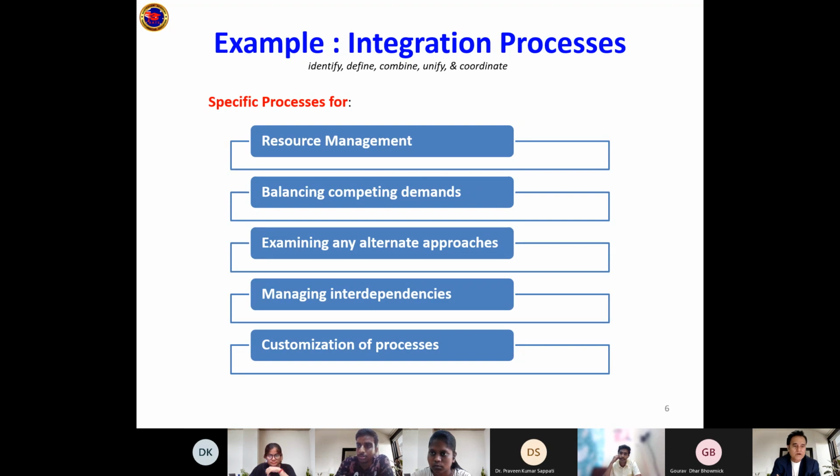In all projects, you will see there are interdependencies. For example, while you're delivering this aquaponic project, multiple teams are working. One team is constructing, another team is laying the plumbing line, the third team is laying the electricity line, but they're working in the same areas. So therefore, there are interdependencies. Similarly, the electrician cannot come unless the walls or the roofs are constructed, or if the aquaponic is going against the wall of the balcony.